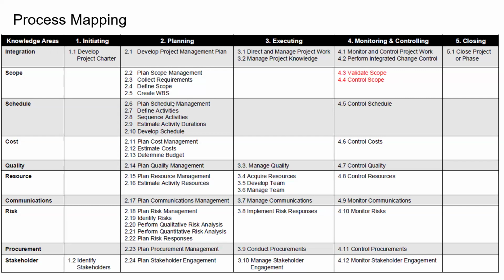Define scope. Once you have the requirements, we discussed in the last class the difference between requirements and scope. A requirement is a required capability the customer or the user is looking for in a product or service, and the scope is what the team will do to fulfill that particular requirement. We discussed a simple example. I want a capability by which I can write on screen, and that is my requirement as a customer. Then the project team's scope is to manufacture a writing board, for example.